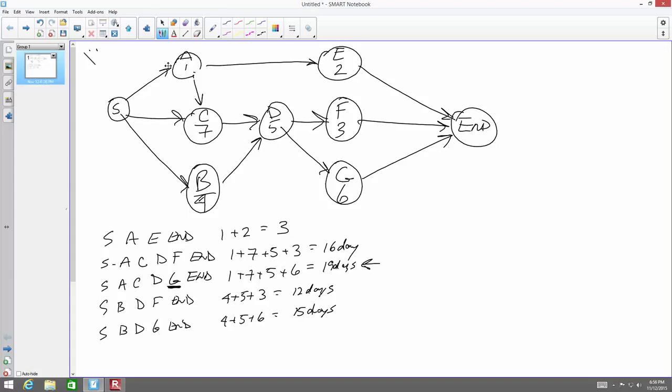Cost plus fixed fee means if I spend $100 on something, I'm going to get reimbursed for that cost, plus I'm going to get a fee on top of that. I'm going to charge them 10%, 15%, 20%, whatever it might be. If we have a lump sum fee, I'm going to give you $100 to do the work. If you can get it done in 10 minutes, great. If it takes you 3 days, tough luck. Single lump sum.